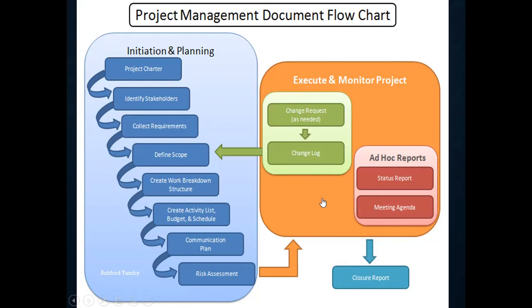And it is logged. Now, when that change request is logged, meaning that it is recorded as there being a request for a change, it doesn't go back to the charter, the stakeholders, the requirements. It goes to the scope, because remember, this change would be affecting the work that you have to do. If there's a change in the work, then there's a change in the scope. If there's a change in the scope, it's going to affect the work breakdown structure. If it changes the work breakdown structure, then your activity list, your budget, your schedule is going to change. You need to communicate this change to all of the stakeholders, and then you need to do a risk assessment of the change that is being requested, right?